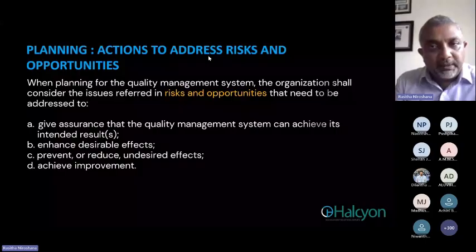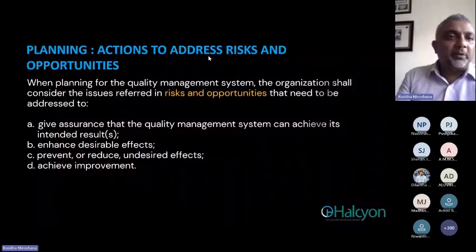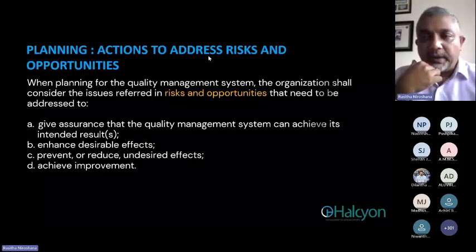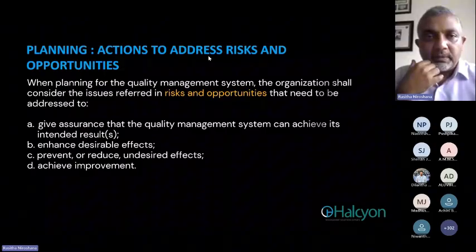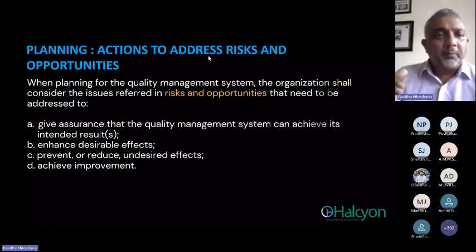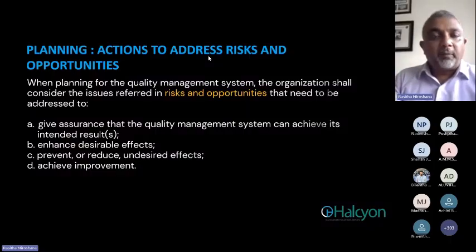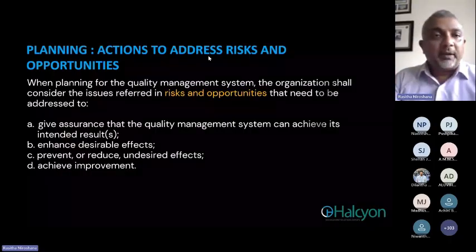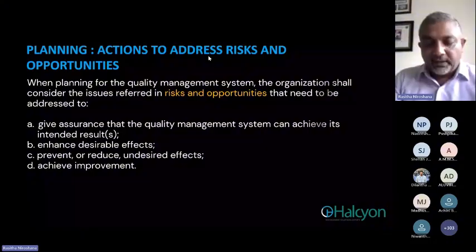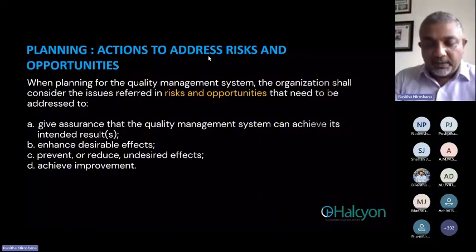Then after you set up the laboratory, you can develop the operational part. How are you going to develop the operation? We have a friend from the power plant, and they go with a two-phase project plan. One is setting up the power plant, which is the biggest role, with engineering work, electrical, civil, a lot of work. And then with the OEM manufacturers, they go for the operational part. That's the second phase. So you can plan the same thing, right?